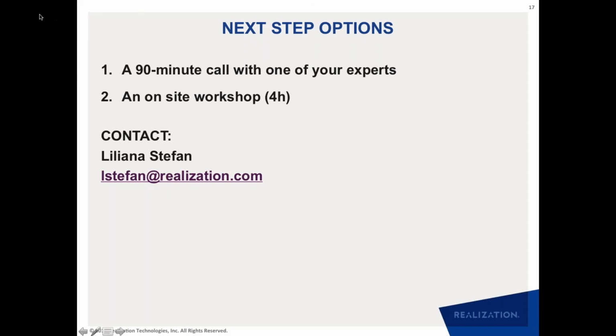And we were forced to create it because we tried to use Microsoft Project to do two-tier planning, and it doesn't work over there. Yes, you can have summary tasks and different levels of tasks, but you cannot contain dependencies properly within a task in Microsoft Project. So we had to create our own software to implement this concept.